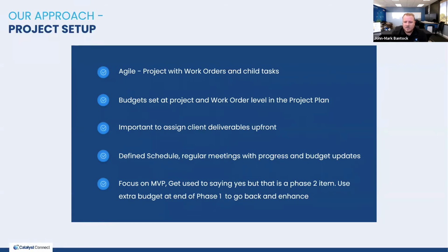It can be very difficult to leverage Sandbox to make those changes. So, there's certainly use cases where Sandbox can be very helpful for functions or features that are plugging into a fairly standard architecture. But if you're changing the architecture of the apps and the workflows, you may need to have a parallel system so you can do that full, thorough user acceptance testing before you push it live.